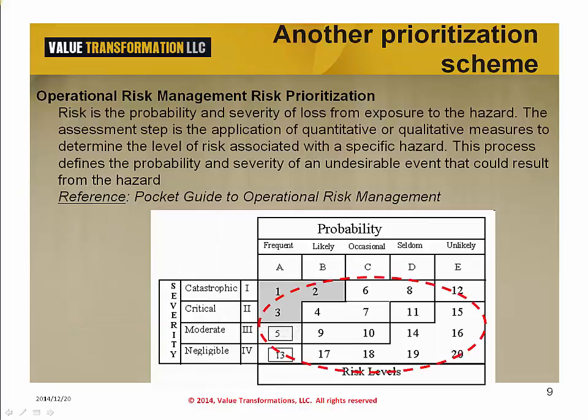The risks and the probability for each risk are assessed until the entire table is populated. Note the sequence of the numbers. The top two risks are catastrophic and occur frequently and are very likely. The next in priority is the critical failure that happens frequently. 1, 2, 3. These account for the most damaging risks to the project.